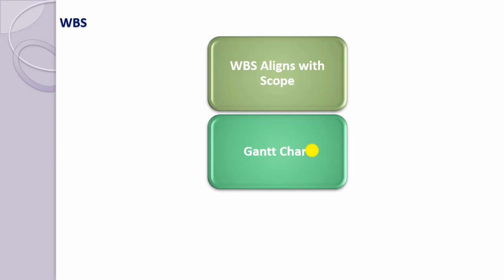I have seen in practical situations where clients come to me and say that we want this project to be delivered within 1 week, 2 weeks, and you can just speed up the work by putting in more resources. Usually, this is not a good idea, because just putting in more resources does not guarantee the work will be delivered very quickly, because the new members take a lot of time.